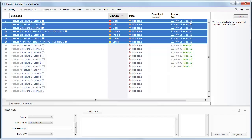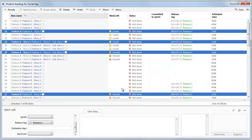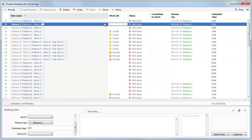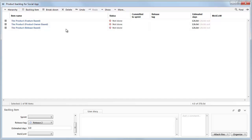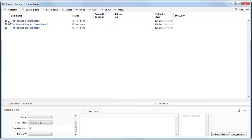So the third advice I'm going to give you is to simplify the interface. I often come out to places where they have a lot of columns. And you can see here I have only five columns apart from the name. Let's go into hierarchy here. The thing is that the more columns you have, the more it will cost to maintain the backlog. And if you have 20, 30 columns, it'll just be a lot of data that you need to input for each item. And after a while, you just stop inputting this. So each of these columns just becomes noise. And it's going to be hard to read the backlog. And you'll have so much information in there that it's just not going to be readable.